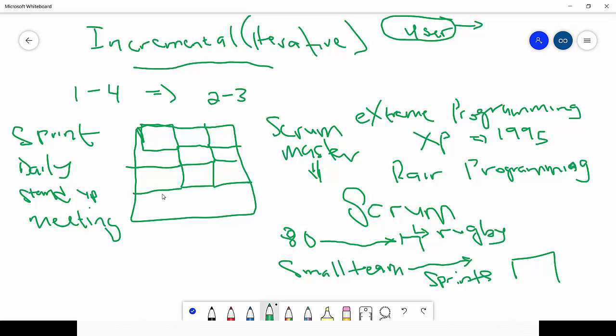It's usually 15 to 30 minutes of meeting on your feet, talking about how the whole sprint team, the whole scrum team is meeting together, standing up, discussing how the sprint is progressing. So it's not a time for chit chat or a time for pleasantries, because there are three things that you must give an update of during each sprint meeting, right?